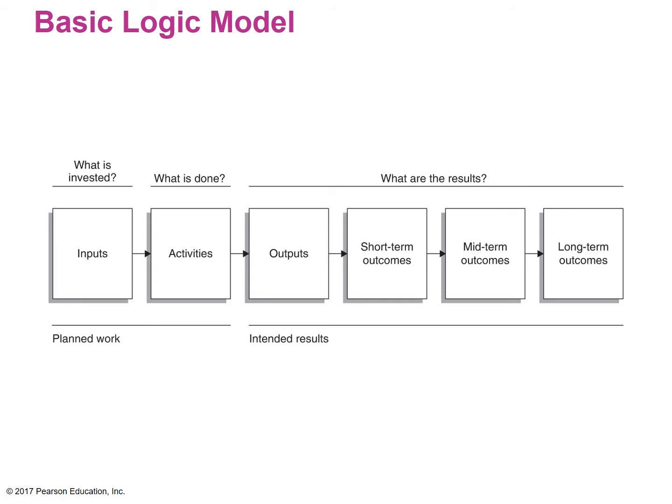So here is a generic logic model, and as you can see, it's broken up into 4 components here. We have inputs, activities, outputs, and then your outcomes. And in some cases, you would have a 5th component to the far right that would be your goal, right? The ultimate program goal. So the idea of how a logic model works is that you build it, remember I said, from right to left, but you read it from left to right.